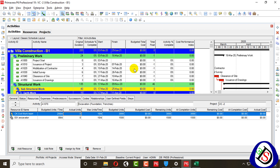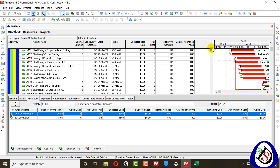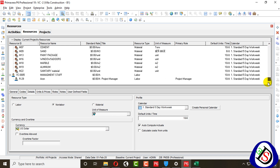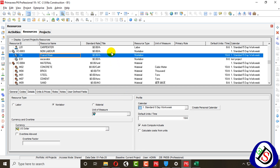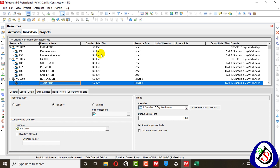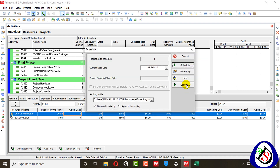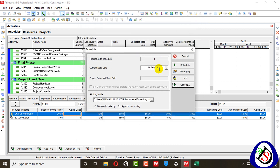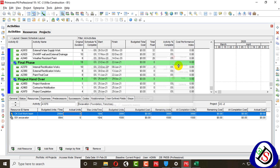The project total cost is displaying 0.00. When I go to Resource, I changed the standard rates to 0.0000, so the overall project cost goes to zero, because when it's multiplied by the project units, the total budgeted units will be zero. I also set it to calculate cost from units. When we press F9 and go to options, we can see 'recalculate assignment cost after scheduling,' so after rescheduling, cost remains zero because the standard unit rate is set to zero.